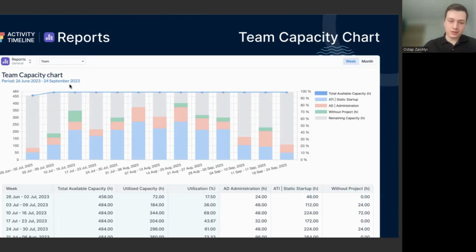So if we reach or go above this capacity, it means that we have more work to do than actually available capacity, available people in our team. So preferably it should stay below the blue line. But if this happens, you can easily spot this and say, okay, maybe I push some work into the future, or maybe I communicate to the upper management, okay, if we are consistently above this blue line, we need to hire more people to compensate for this workload.